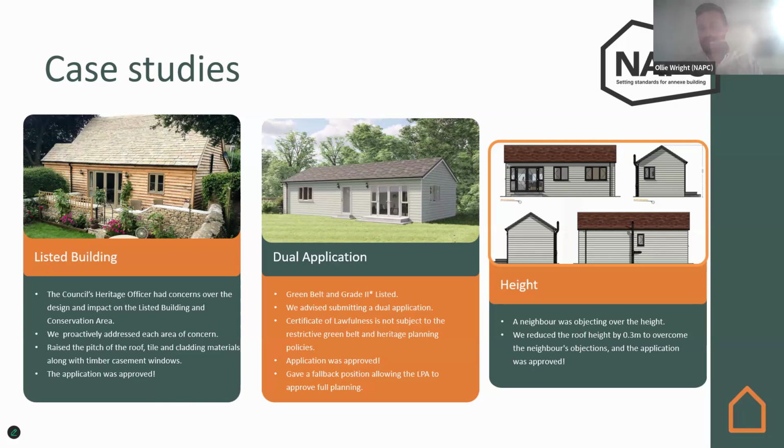So we gave the council this high court decision and said, "This is a precedent. You've got to take it on board." They said, "Yep, we'll have a look at it. Thank you very much." They went back to their legal team, came back to us and said, yeah, we agree with the assessment. It is a fallback position. And this then allows us to approve the annex application, which we were going to refuse in the first place.